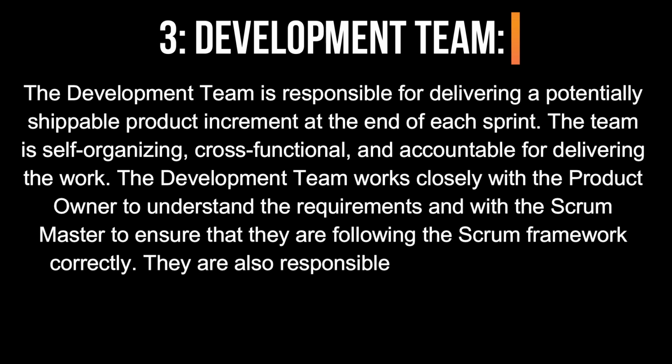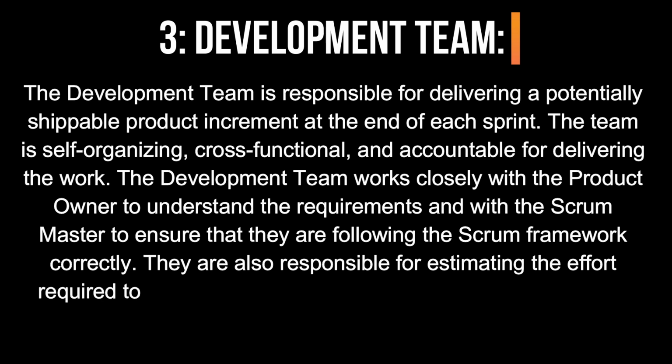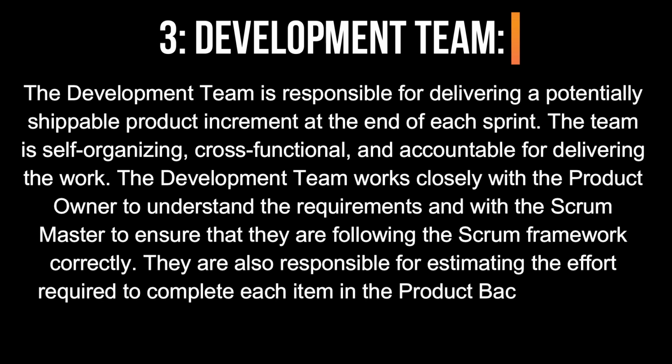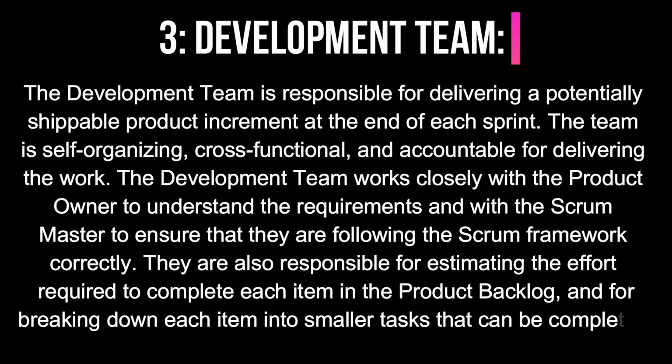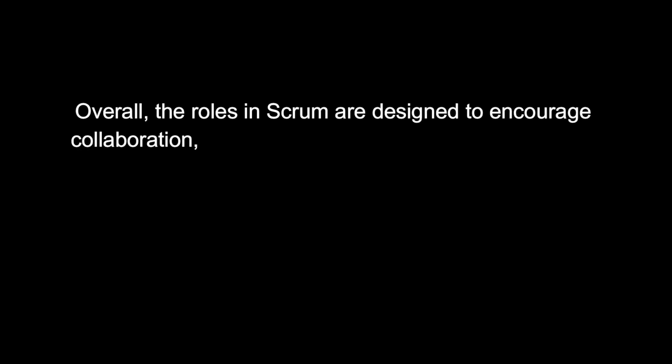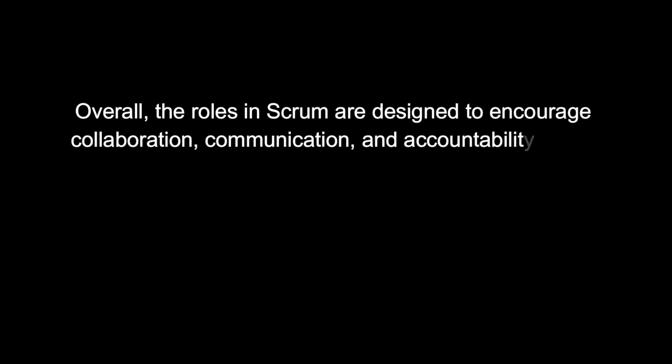They are also responsible for estimating the effort required to complete each item in the product backlog and for breaking down each item into smaller tasks that can be completed within the sprint. Overall, the roles in Scrum are designed to encourage collaboration, communication, and accountability.